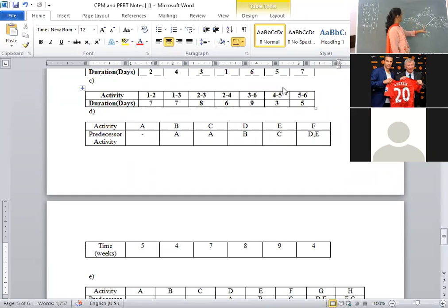The formula is minimum of L4 minus T24, comma, L3 minus T23. Here that is minimum of 12 minus 7, comma, 13 minus 4. 12 minus 7 is 5, 13 minus 4 is 9. Minimum of 5 and 9, minimum is 5.